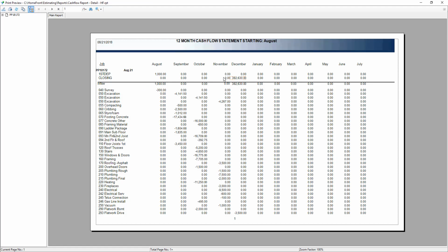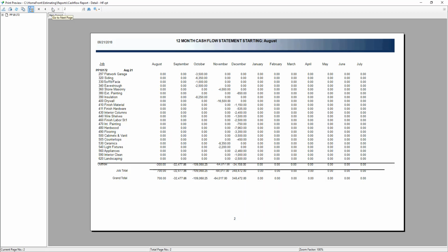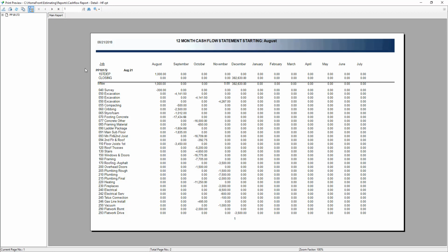It will show us our deposits that we were expected to receive, our closing costs that we expect to receive in December on closing, and for now, what are our cash requirements based on our costs, where we can see trends over time of all the monies that are going out. And then we can see what sort of cash requirements we have going forward. Very useful information.